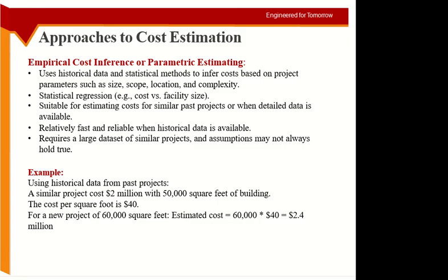Okay, so you can use it if you can find similar projects, obviously. So I'm going to build a state-of-the-art exhibition, what do you call it, exhibition mall or exhibition theater, which is not available in Bahrain. I'm going to have like 3D facilities there, and the best of the facilities there. So if the project example is not available in Bahrain, then this type of thing is very difficult to be done. Okay, so we need something which is very relevant to do this type of an estimate.